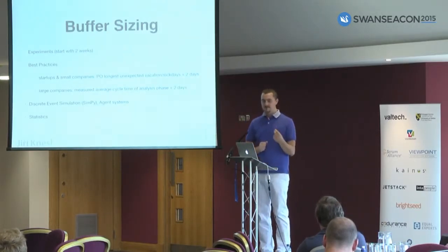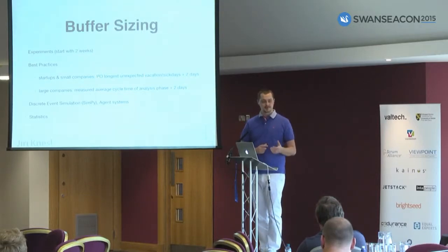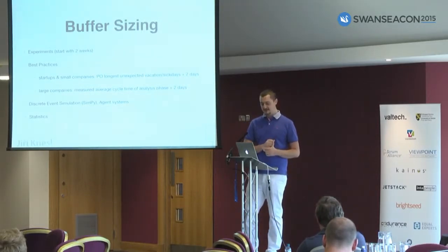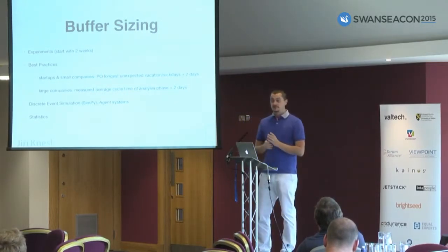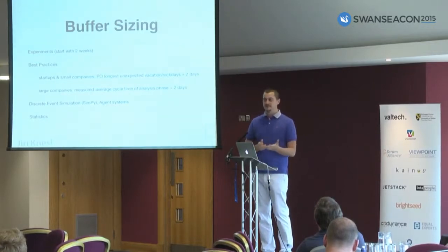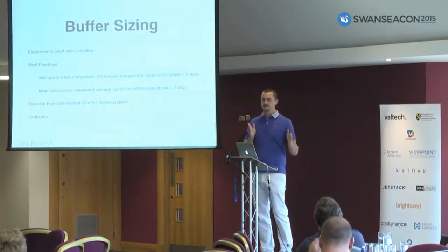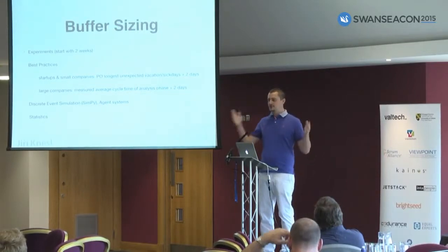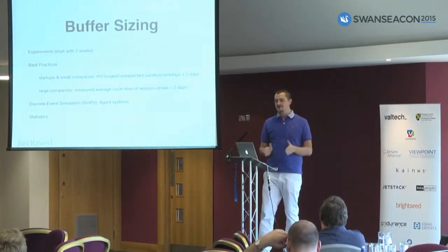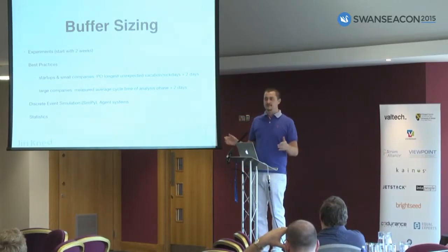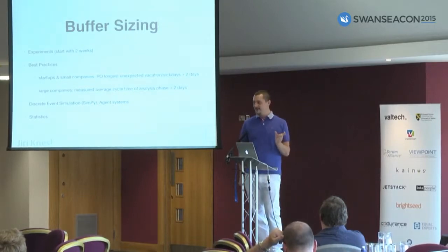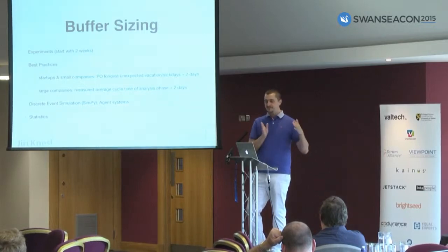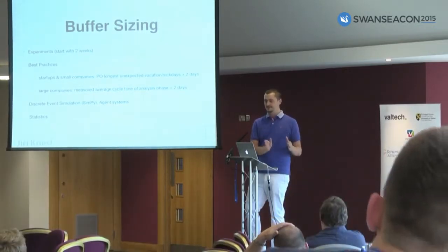So how to size the buffer? There are a couple of approaches to buffer sizing. First is experimenting. Then you can use the Scrum approach. Scrum approach is, I have iterations. Each iteration has, for example, 1 week or 2 weeks. So you always have a buffer of 1 week or 2 weeks, or somebody has 3 weeks. I saw an implementation of Scrum with 2.5 days per iteration, but it's very rare. Most of the time it's 1 or 2 weeks. So you have a 1 week buffer all the time.